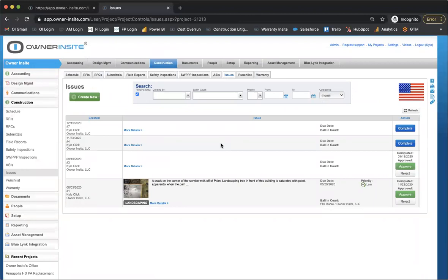Please add that to the issues tab. Anything that is an issue, like the grab bars falling down or the sinks falling down, whatever is happening, you want to add it to the issues tab, because if you send me an email, or send Brian an email, it's just going to be in our email and we'll know about it, but that doesn't mean anybody else knows about it.